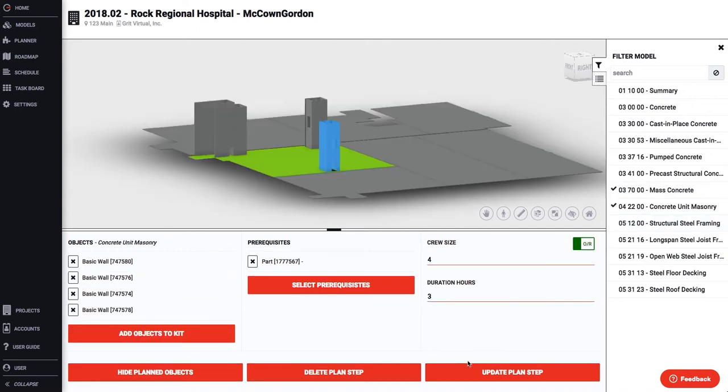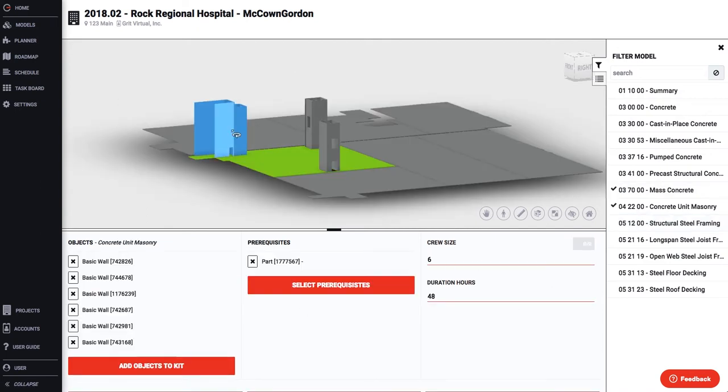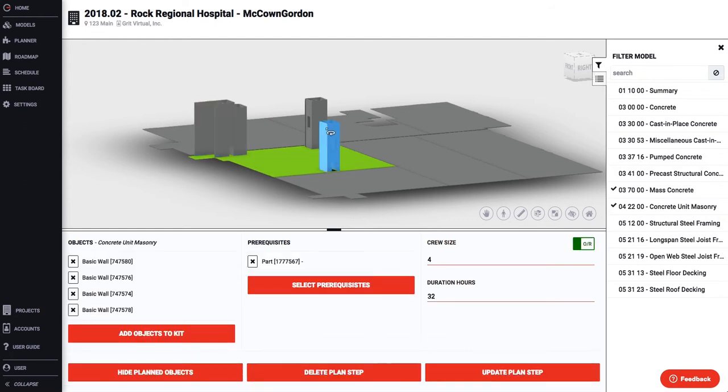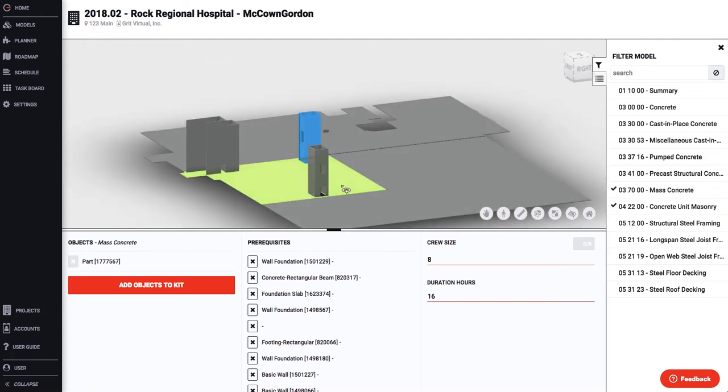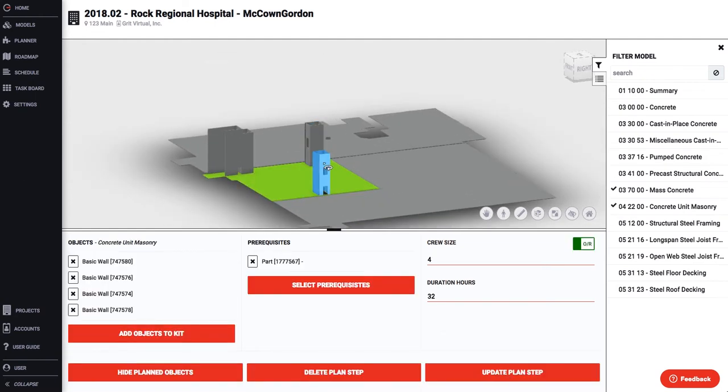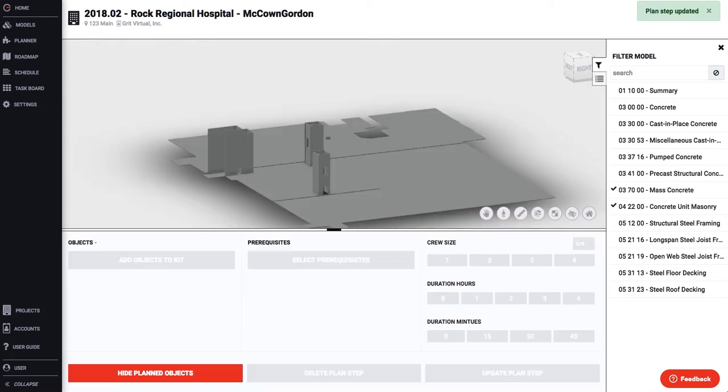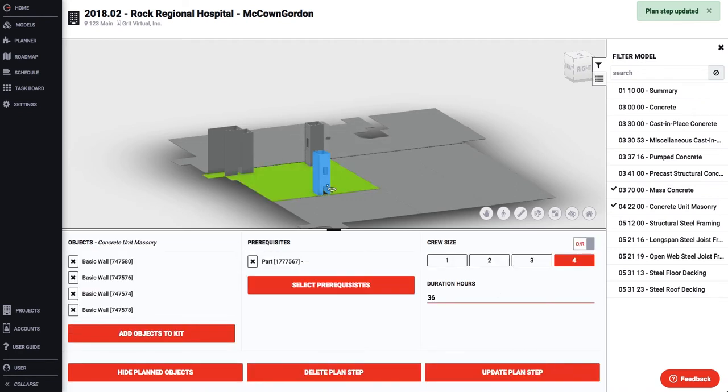Now, if you remember from our previous videos, you knew that we limited crew size to 4 and duration of activity to 445. This is the rule in the system that allows work areas to be synchronized and also more scenarios to be run. We always understood there were to be exceptions to this rule, and we have created an override for the general contractor user. They can assign any amount to the crew size and any duration to an activity, such as these 3 elevator shafts.